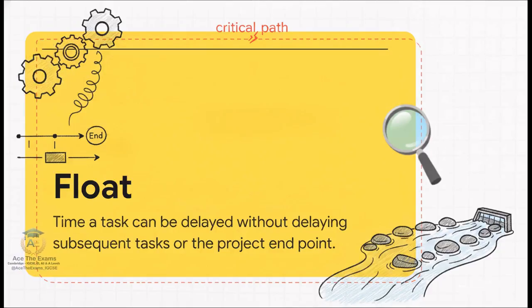Sam writes, the project will be late. But a top-tier student writes, the 3-day delay will push back the final endpoint. Point. Because the task has 0 float, it is on the critical path. Evidence, explanation, meaning the new hospital system implementation will miss its launch date by exactly 3 days. Link. See the difference? That's how you secure maximum marks.